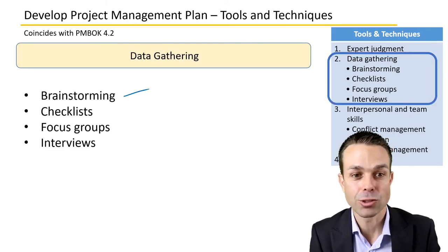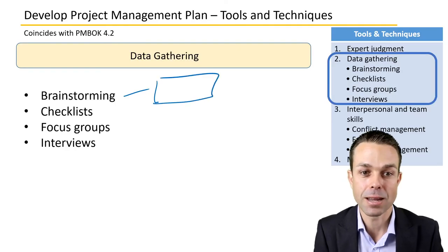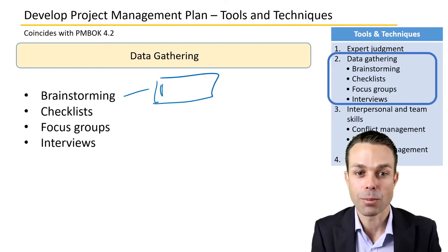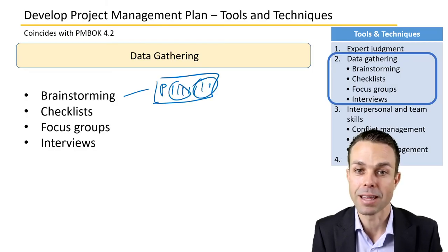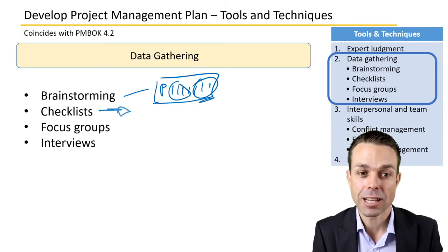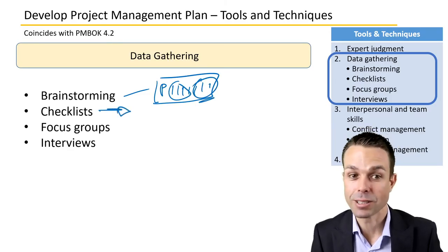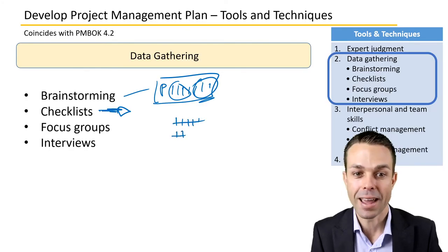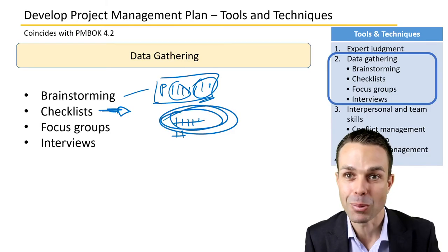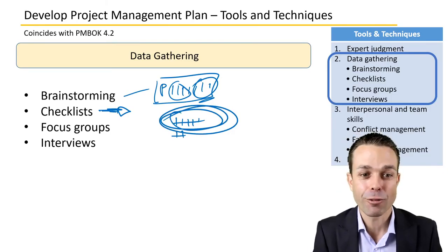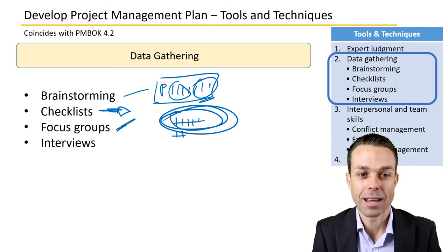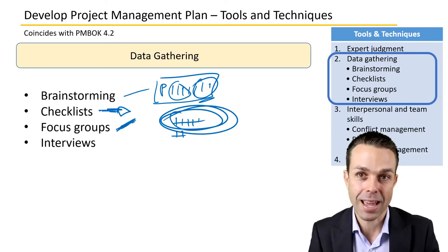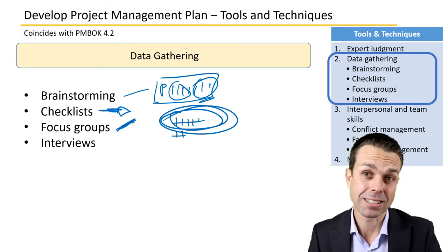You can do that through brainstorming, which is usually having a meeting, getting everyone together, saying here's our problem, and what are the ideas, writing them all down, and usually grouping them together. Sometimes as well, that can help. Checklists. Maybe you need to actually gather data on a process, and you can look at a checklist. Maybe you're doing this item 5-6 times and this item only 2 times, and this is the item that we want to focus on for our project, for example, as a checklist. Focus groups, getting everyone together and using something and then watching how it's being used, getting their feedback as customers.